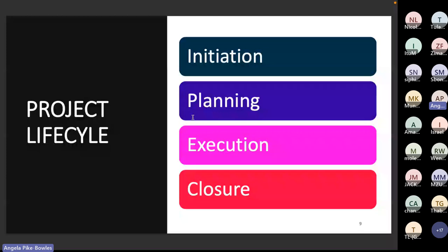They're going to take notes, identify maybe what needs to be changed, and from there a snag list can be created for the construction company to perhaps touch up one or two things, or fix a wall that may have been scratched during housekeeping and removal of equipment. Once the top management are 100% happy, the project is then closed and the hotel can open for business.